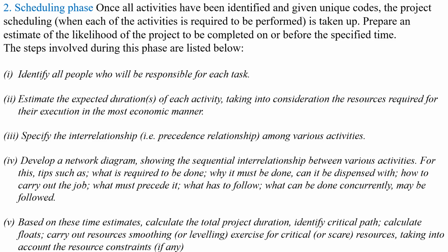So what are they? What is required to be done? Why must it be done? Can it be dispensed with? How to carry out the job? What must precede it? What has to follow? What can be done concurrently? What may be followed? So these are the questions you have to form in making the network diagram.